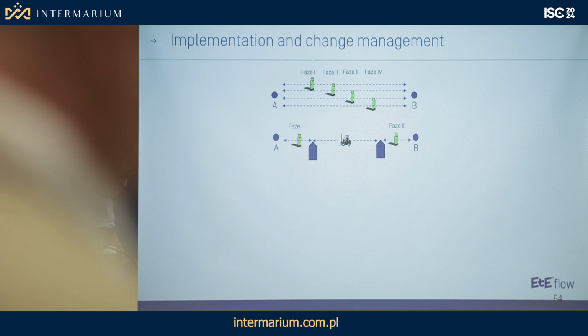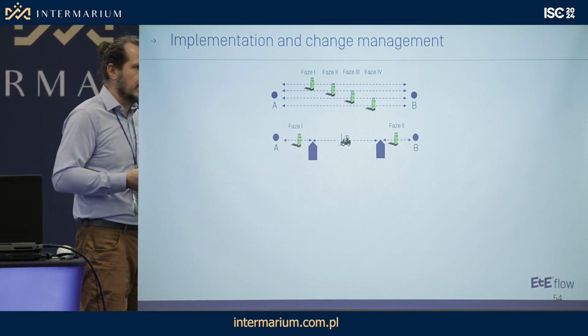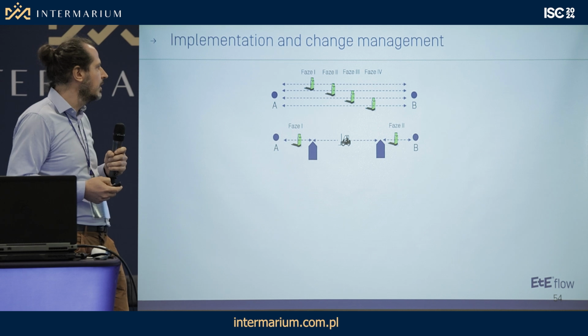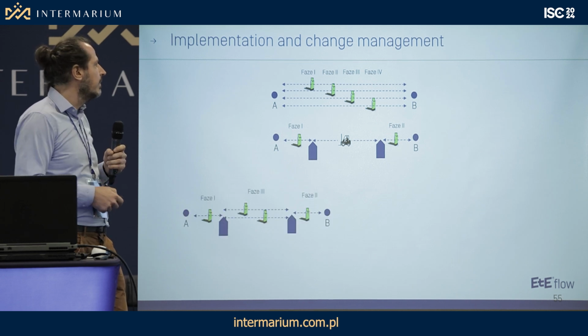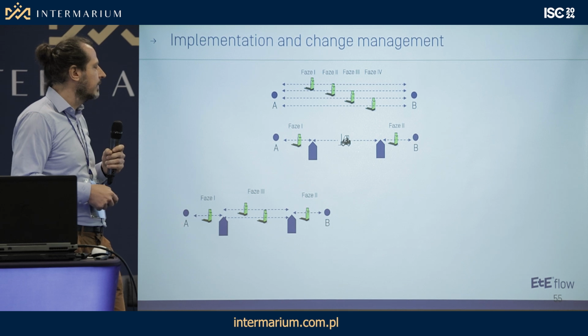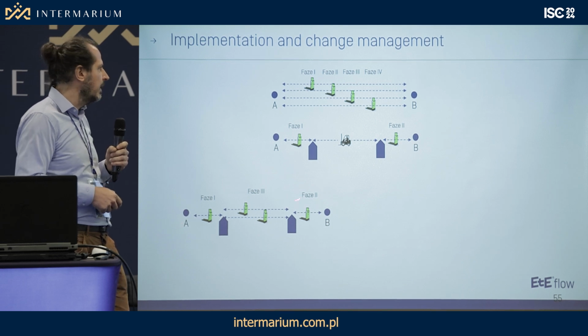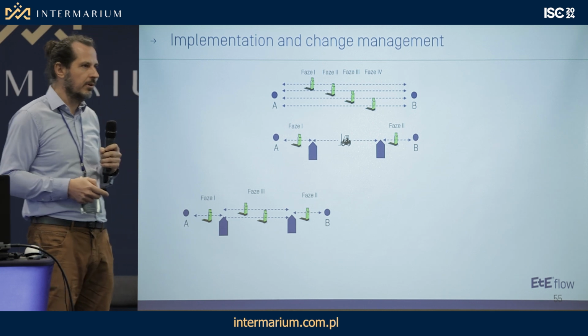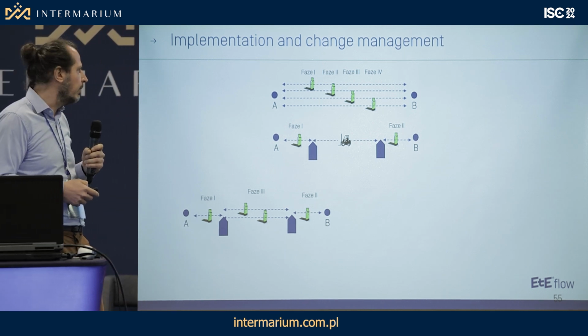And after a year, when we collect more money for buying another 2 robots, we can decide if we buy another 2 robots and implement them in the already prepared system, and implementation of these robots will not affect those implemented before, it's quite straightforward.